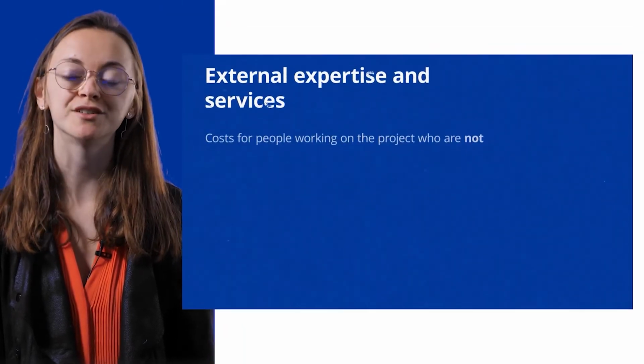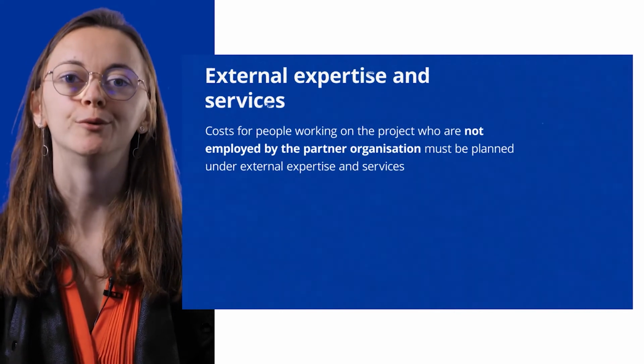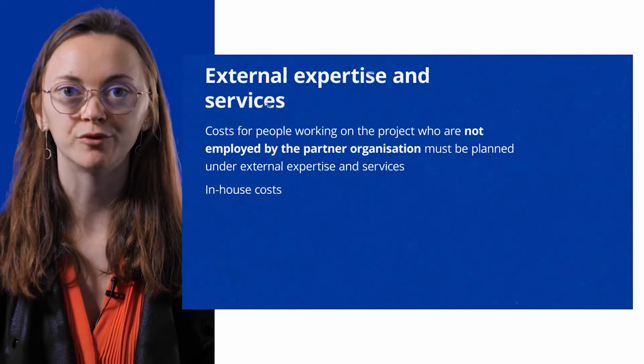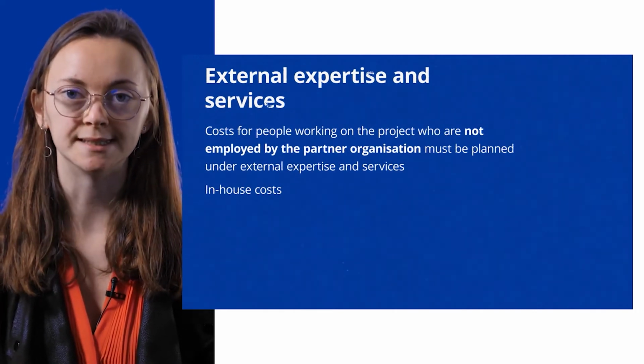So now back to more general advice. If you have people working on the project but are not directly employed by the partner organization, then the cost should be planned under external expertise and services. We know, for example, that some partners rely on in-house staff members to implement the project activities. For these, there are two possibilities.